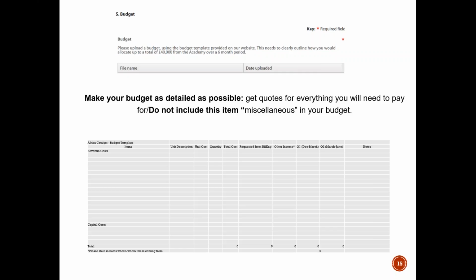So the budget here also, if you look at the budget, we have the revenue cost, capital cost, and the total. I would also advise you take the activity plan and, step by step, one by one, you look for the step. For example, activity 1, what do you need exactly as money, as cash? What do you need? You need, like, I don't know, renting a room, paying the staff, travel, accommodation, food, equipment. So put it.